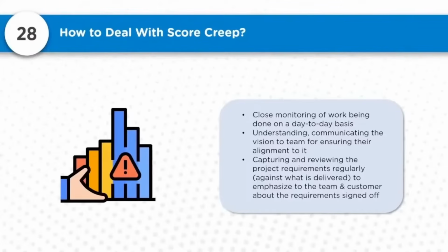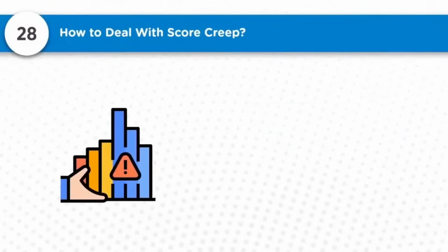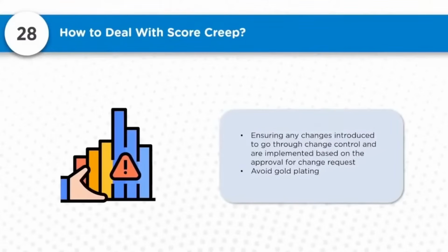Then capturing and reviewing the project requirements regularly against what is delivered, to emphasize to the team and customer the requirement that was signed off, so that someone will not come and influence you or make you deliver additional things. They need not push you. Right, ensuring any change introduced goes through change control. So no changes without proper approval by the authorities, so that only what is required is implemented, and that is done formally through the formal change request.